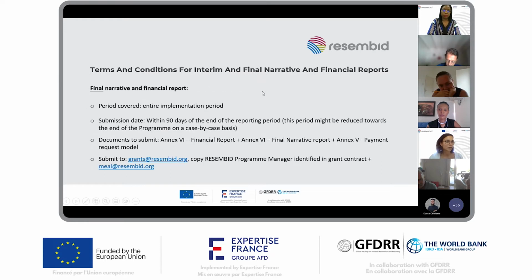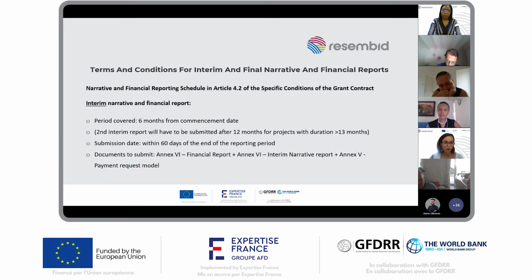For example, for a project starting on January 1st, 2022, the first interim report would cover the period from January to June, and you would have to submit the report by the end of the month of August.